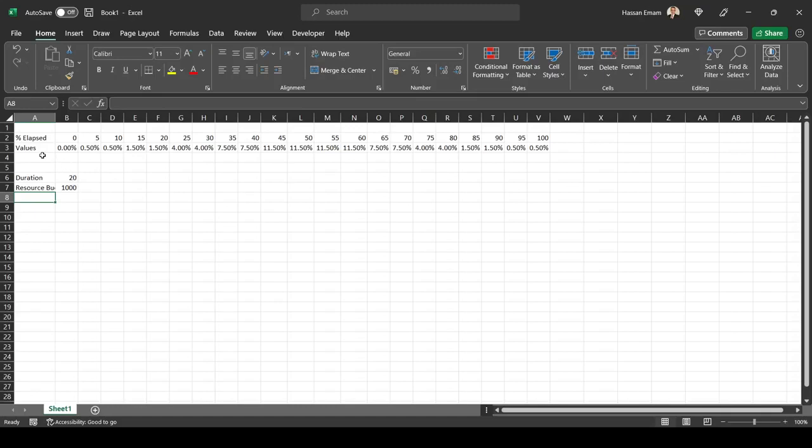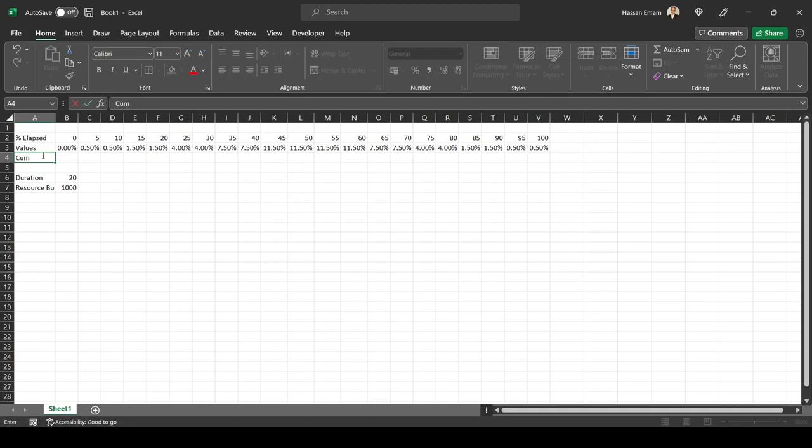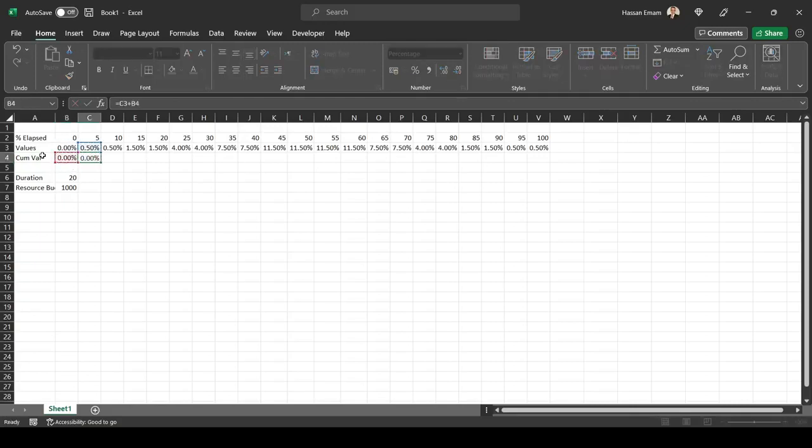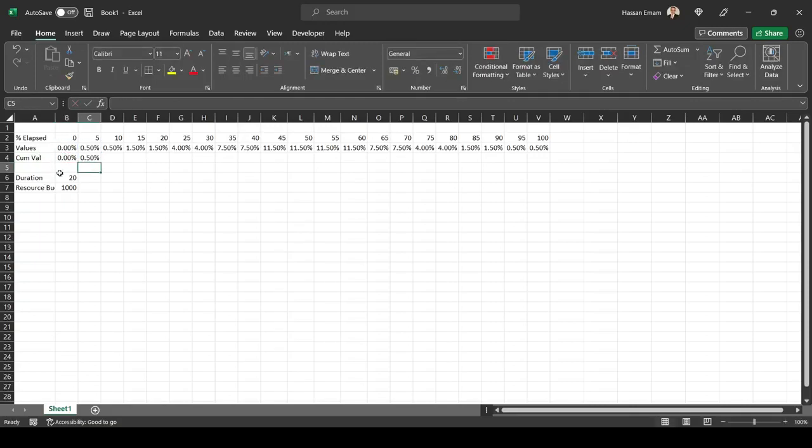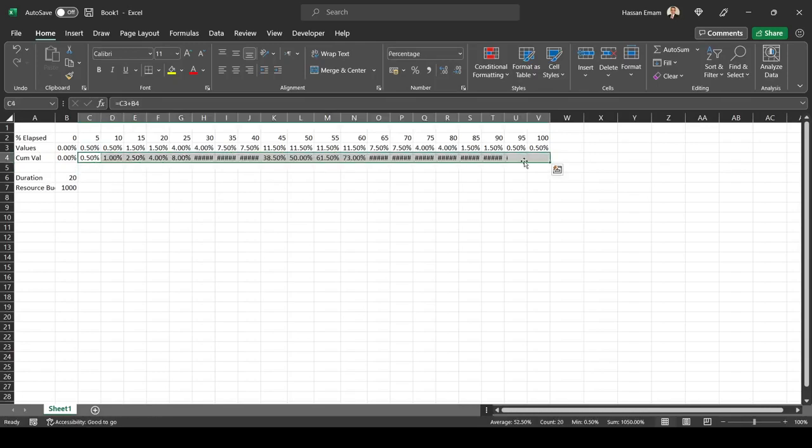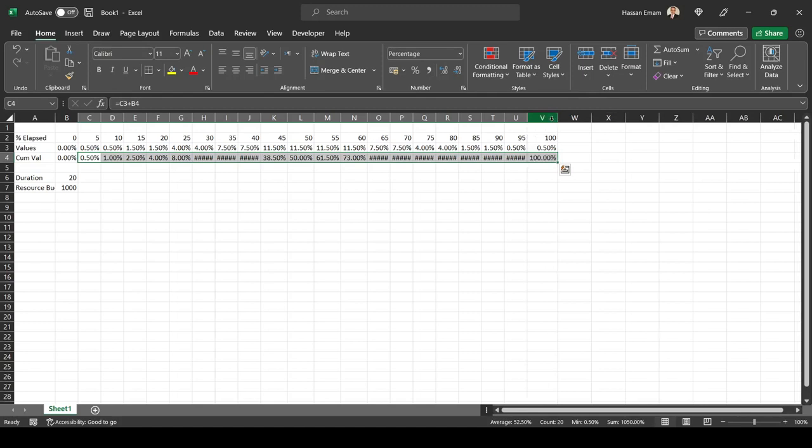One thing that I like to do most of the time is these values of the distribution are in pairs, I like to calculate the cumulative. This will also show us that it is adding up to 100 percent. Everything looks okay.